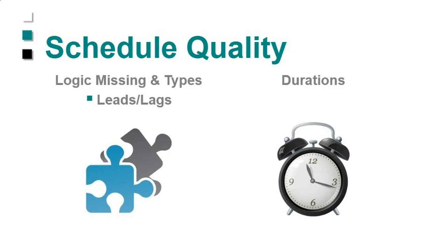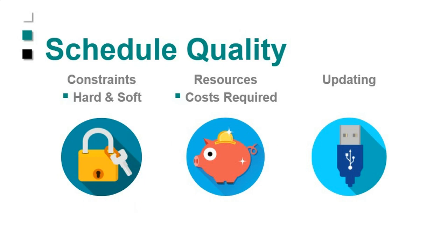And some of them, of course, are activities, whether your activities are a reasonable size, whether your activities have a good amount of logic and sequencing, or predecessor successor development, whether or not you're using an inordinate amount of constraints, so it's more of a picture, or whether it's truly a schedule with a real living, breathing critical path.